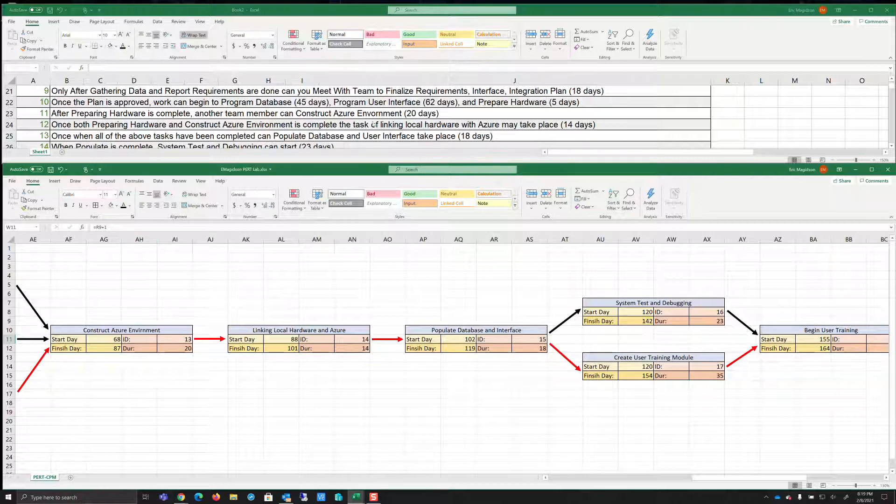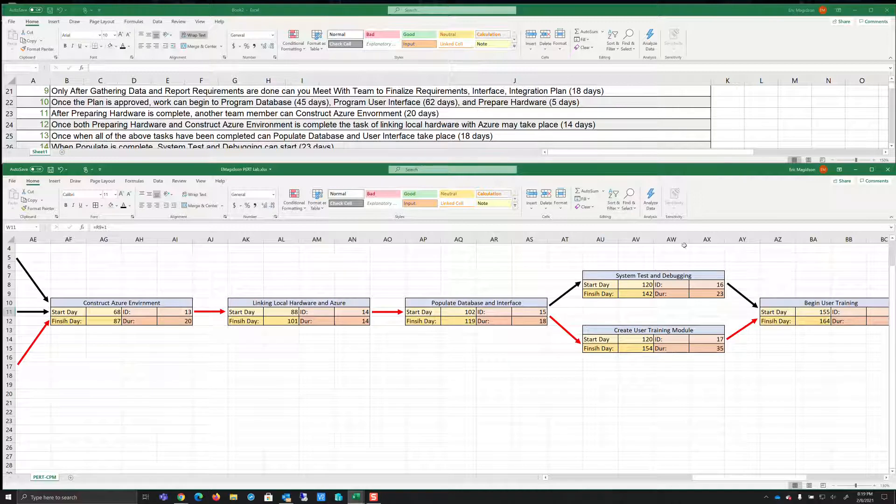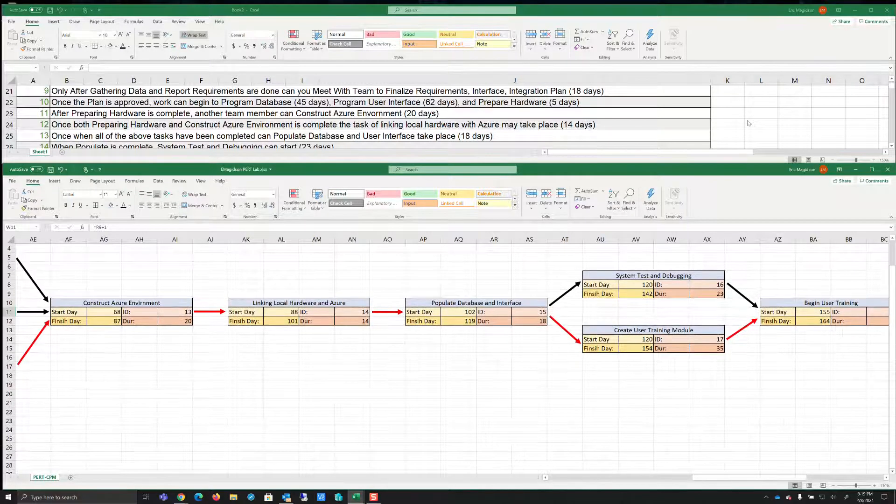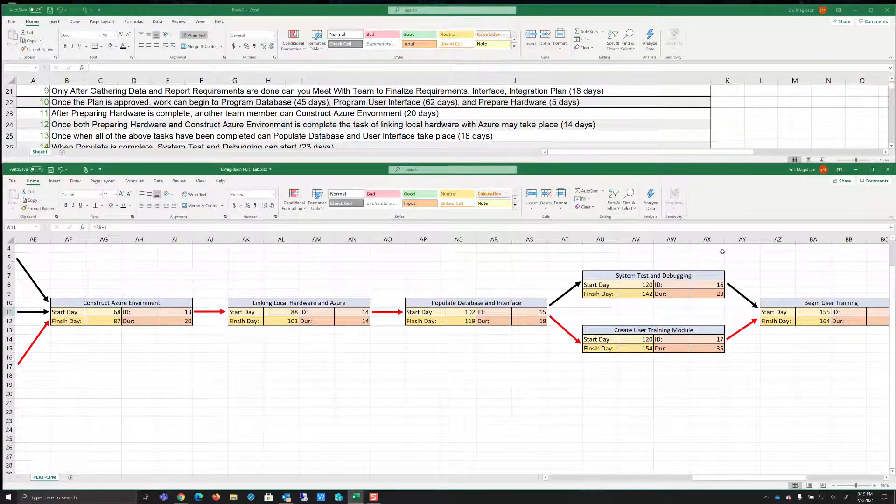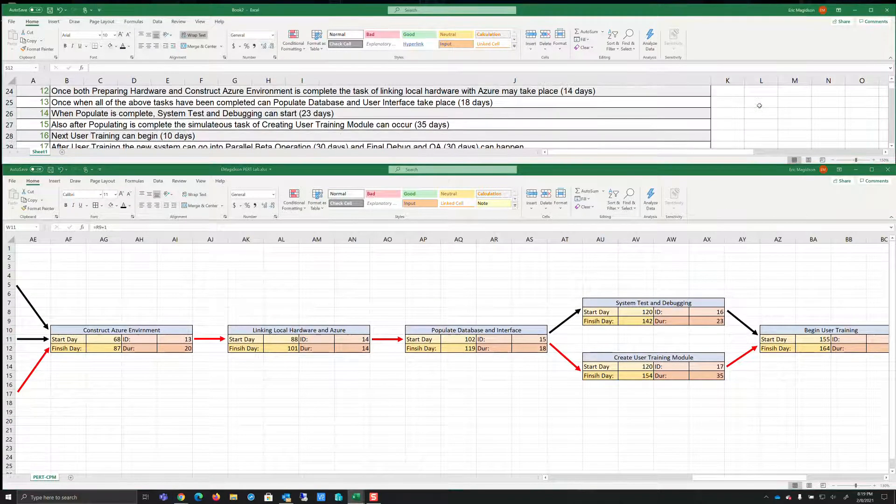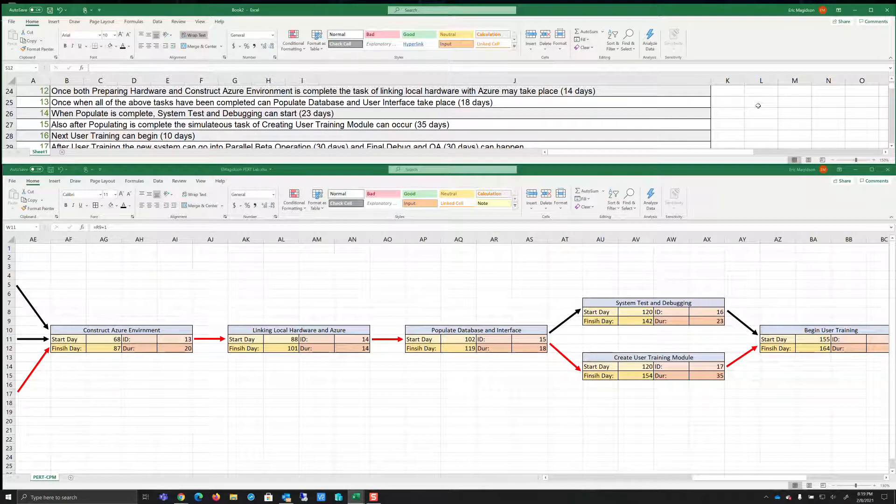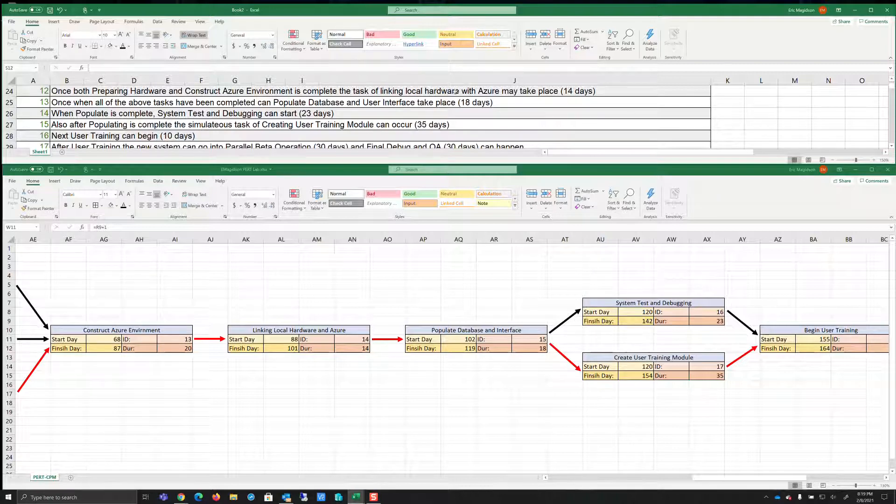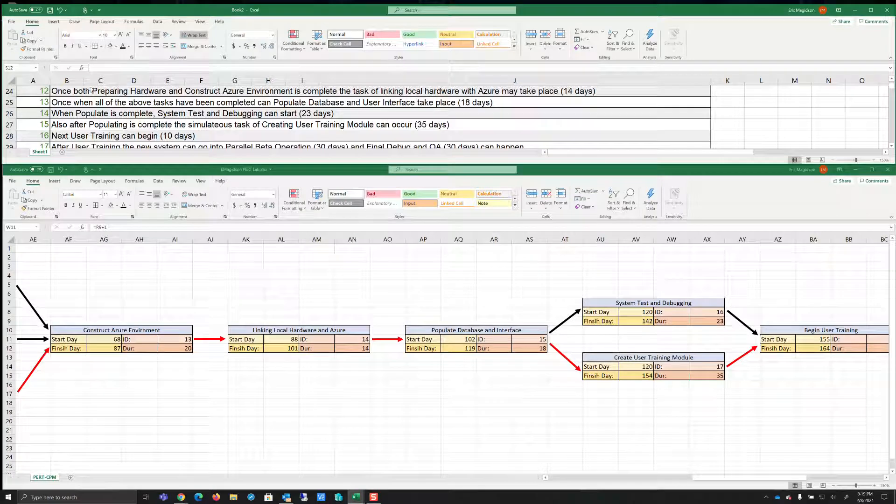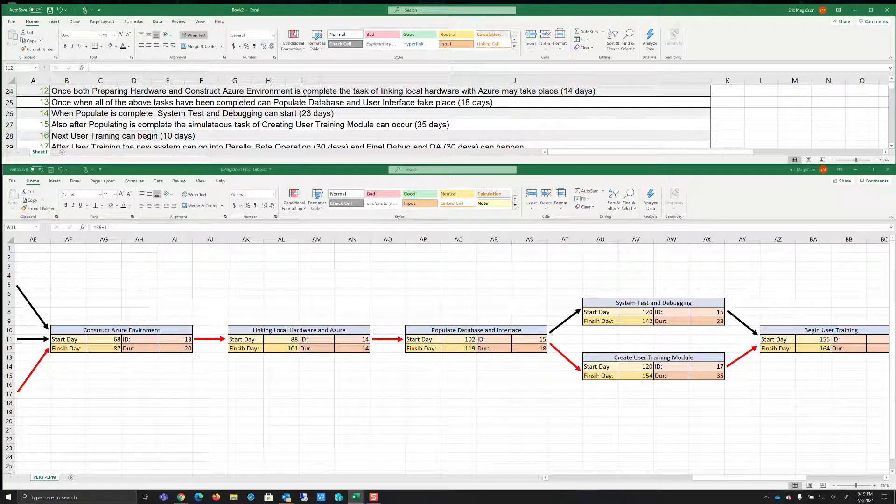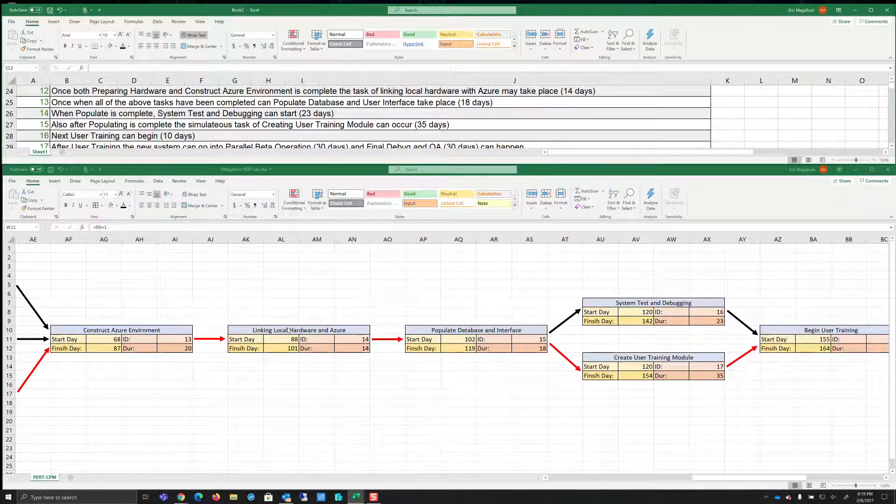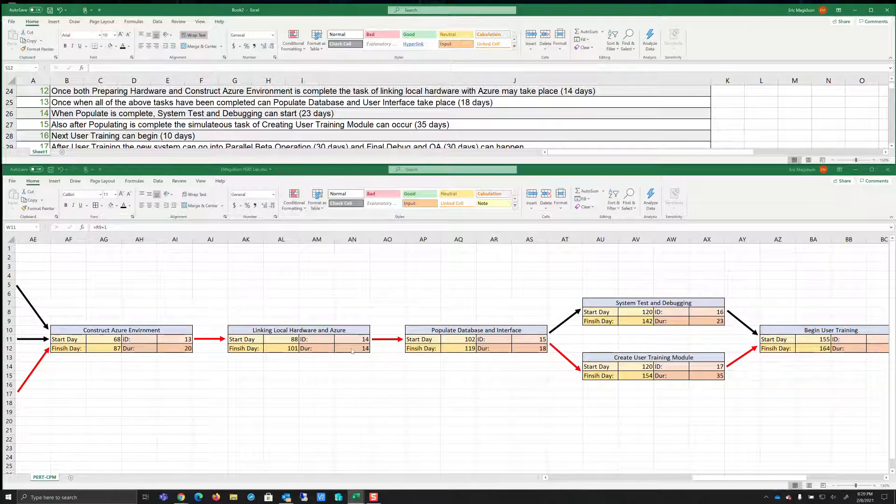So there's our construct Azure environment. 68 is going to take 20 days. Add those. It's 88 minus one is 87. Construct Azure environment. Then it says once both preparing hardware and construct Azure environment is completed, the task of linking local hardware with Azure can take place. So we're going to link local hardware with Azure. That's going to be 14 days.